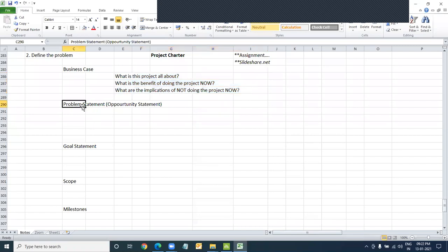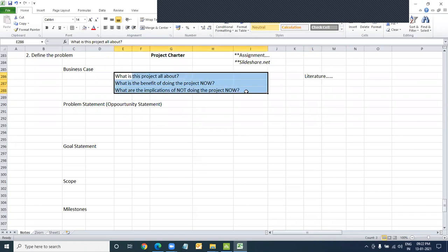The opportunity statement or problem statement is numeric. The business case is generally literature. You don't get into facts, figures and analysis in a business case. You end up drafting it, it's pure English sort of thing. But you make big claims in there, and you explain a lot. There must be some justification. You can't just say this will happen, that will happen. You must have done something. That's where I will say the problem statement is the numerical justification of what you claimed in the business case.